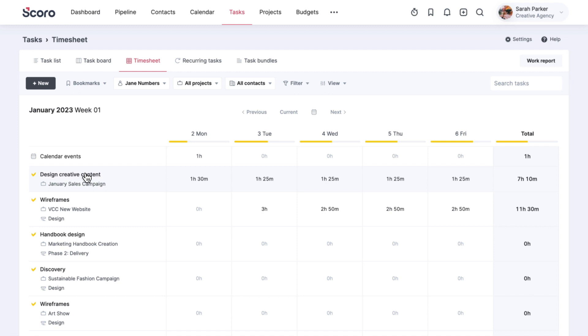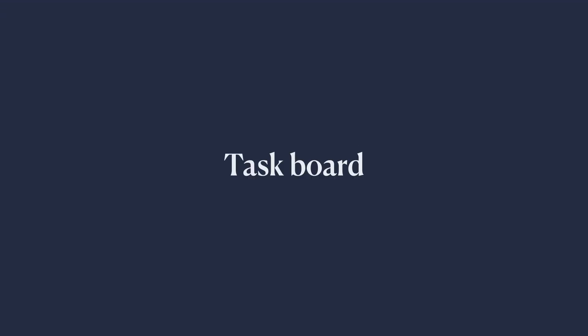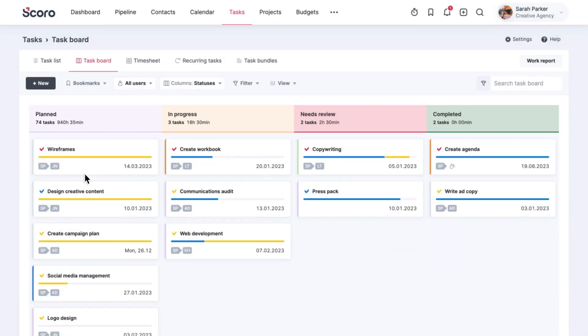Number three, Task Board. If you work by the Kanban method and create a backlog of assignments that each team member can pull whenever they become available, the Task Board is your go-to solution for coordinating work.